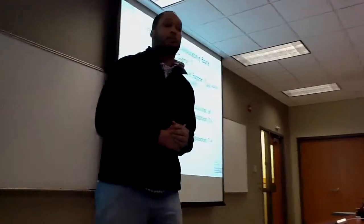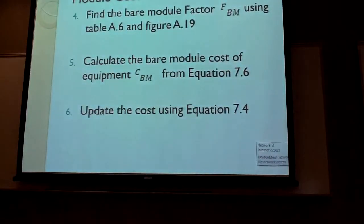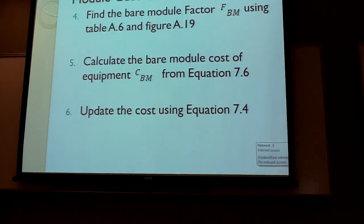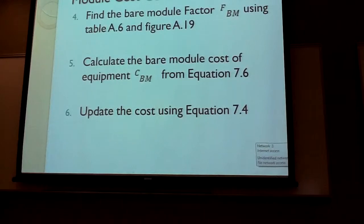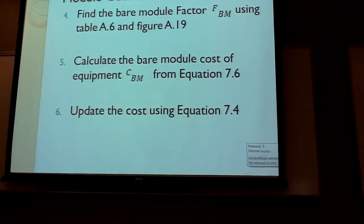Next, you would find your bare module factor F sub BM. This is done by using table 8.6 and figure 8.19. Then you would calculate your bare module cost C sub BM from equation 7.6, and then update that cost using equation 7.4.